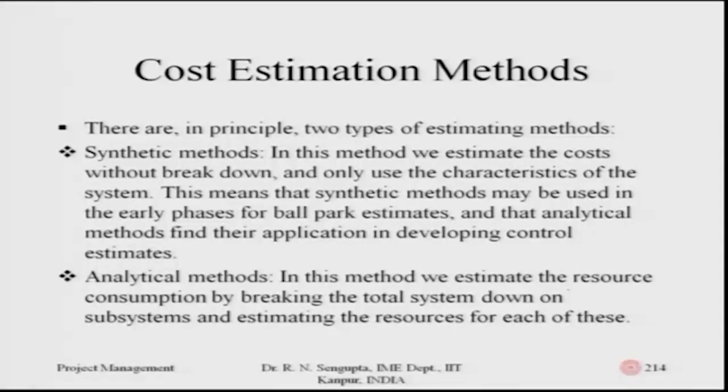There are in principle two types of estimating methods. One is the synthetic method. In this method, we estimate the cost without breakdowns and only use the characteristics of the system. This means the synthetic methods may be used in the early phase for the basic ballpark estimate which you want to make, so, overall bullet point costs, and the analytical methods find their applications in developing controlling estimates based on which you can work.